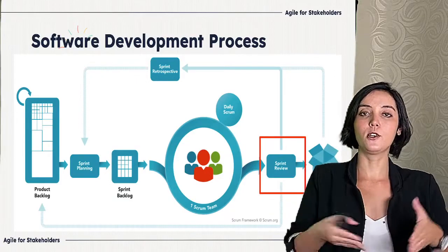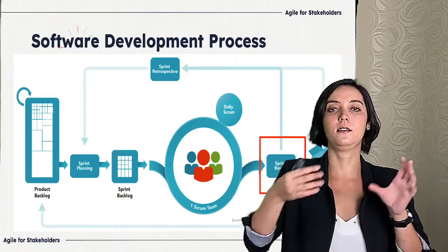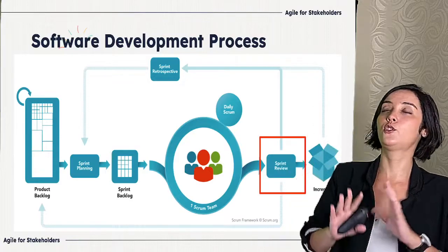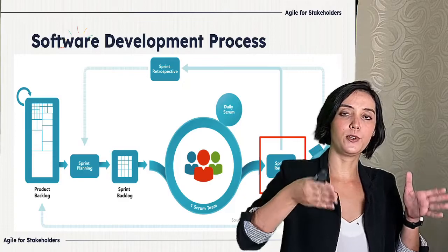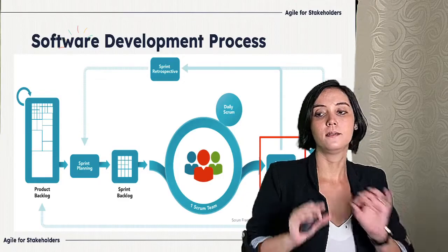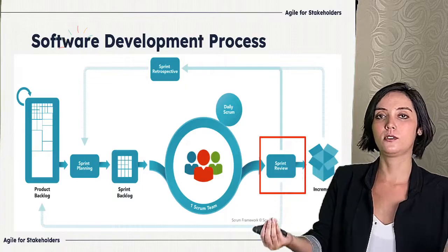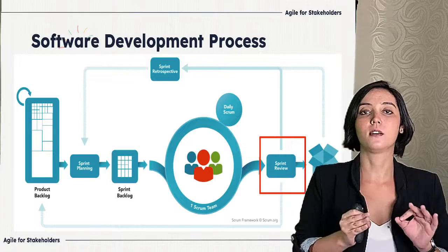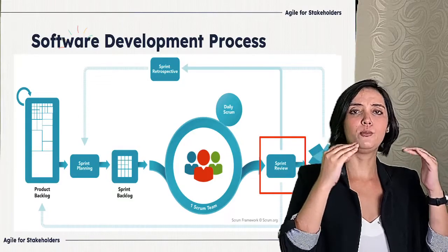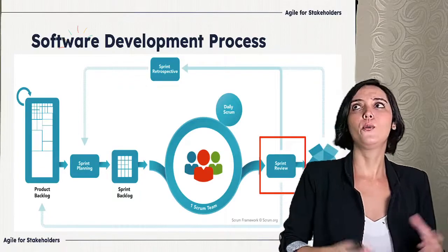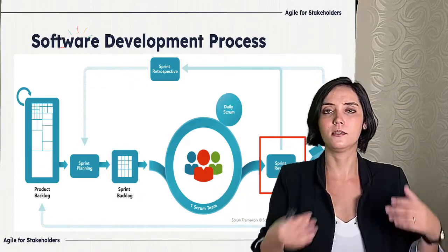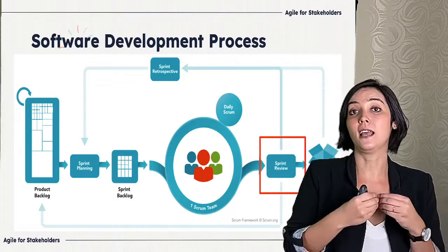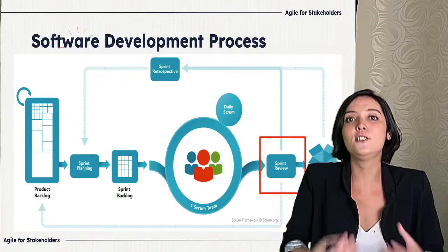And during the sprint, we have several other events. Okay? So let's think of the sprint as a cycle of 2 weeks. So every sprint takes 2 weeks. Okay? And how do we do a sprint? So we start with the product backlog. What is the product backlog? It's everything that should be done to deliver the product. Oh, we need to have the whole product backlog ready? No, we need to at least have the start of the project, because in Agile we embrace change, so we don't need to follow a plan.